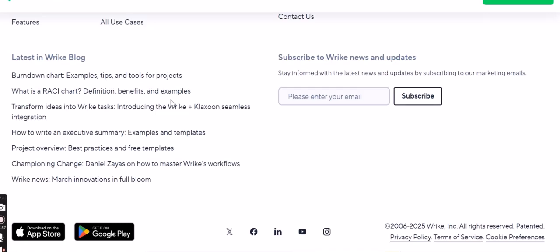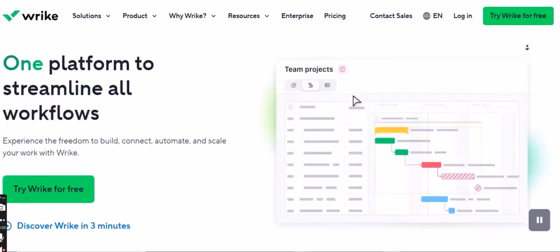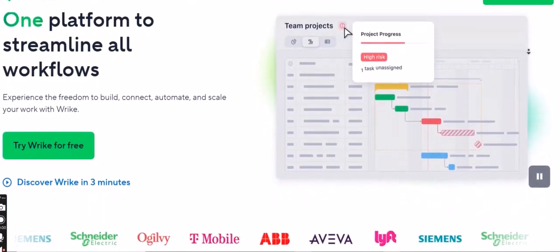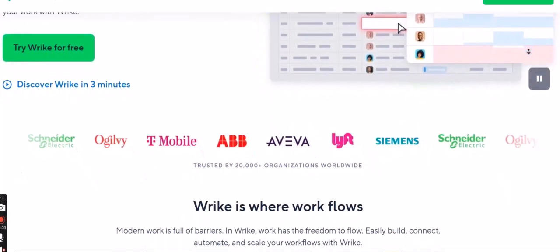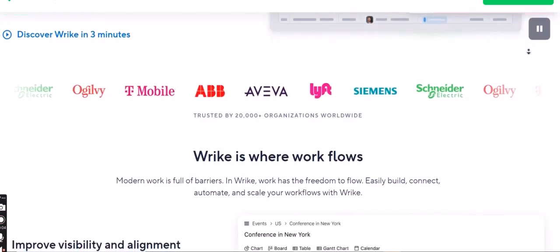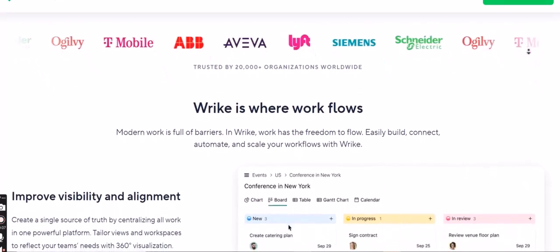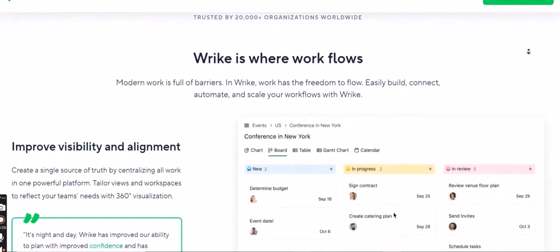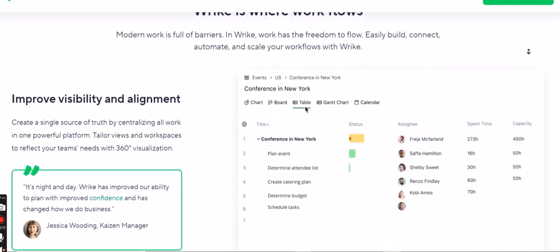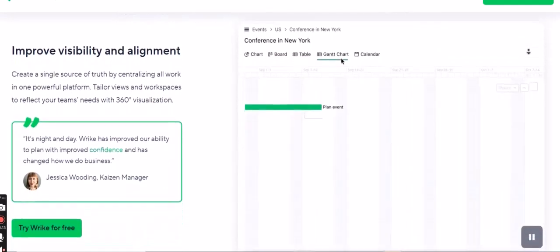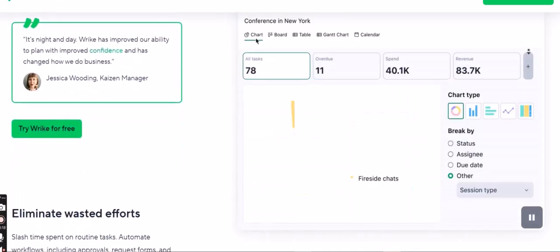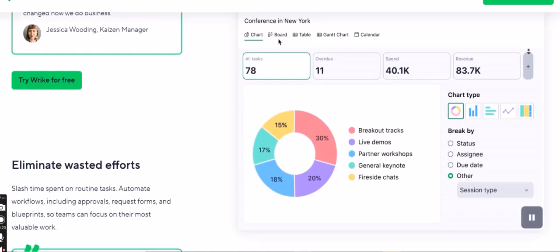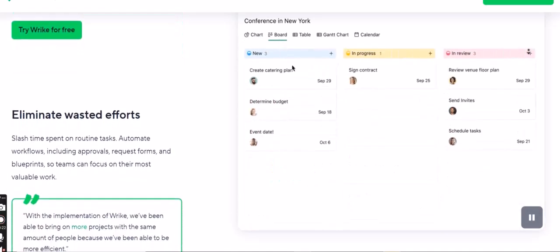Define access permissions. This is a crucial step. For each user or group you add, you can define their level of access to the project. Wrike typically offers several permission levels, such as full. Users with full access can view, edit, create tasks, assign responsibilities, change statuses, and invite others to the project. This level is usually granted to core team members actively involved in managing the project.